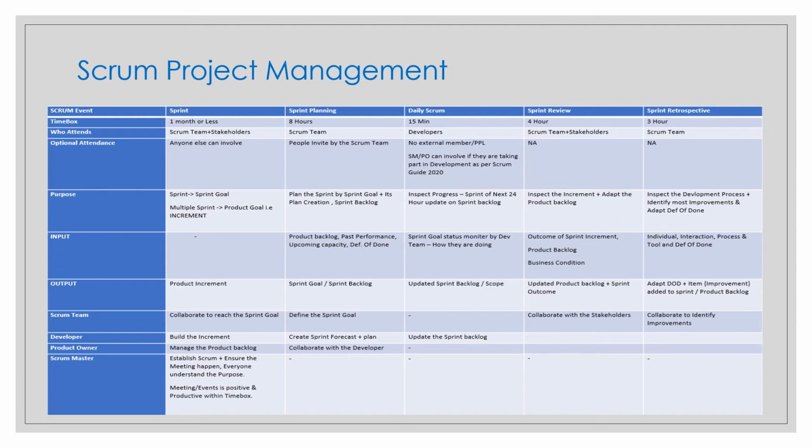If the CEO of the company comes and asks the development team directly to make changes, the first step is for the developers to discuss with the product owner how feasible it is, and how it will work out based on the client requirement, and only then will a decision be made on whether the changes are required or not and what to do.